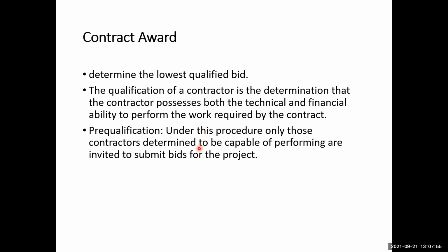Another thing, for qualification purposes, of course, it is not that easy to determine at the time of the bidding whether the bidder is qualified or not. So a process called pre-qualification is adopted. Under this procedure, only those contractors determined to be capable of performing are invited to submit bids for the project.